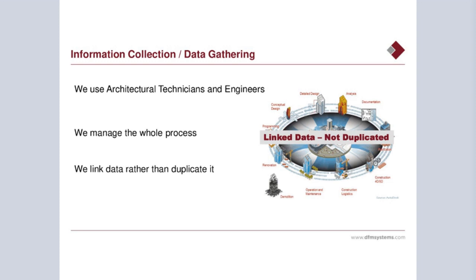We manage the whole process, collecting the information from subcontractors and main contractors, reviewing that information before presenting it to the design team for approval. And we would work closely with the PSDP on all projects to ensure that the information that's being collected is fit for purpose and is the information required on the project itself.